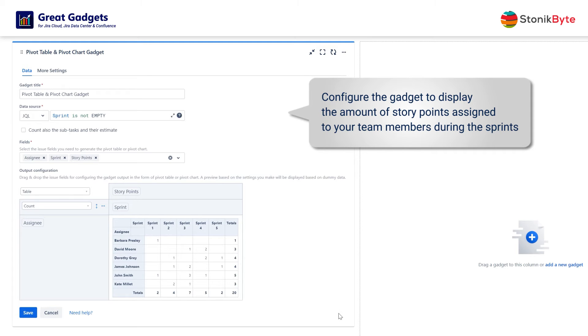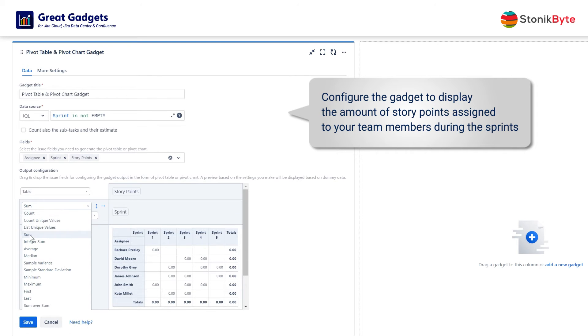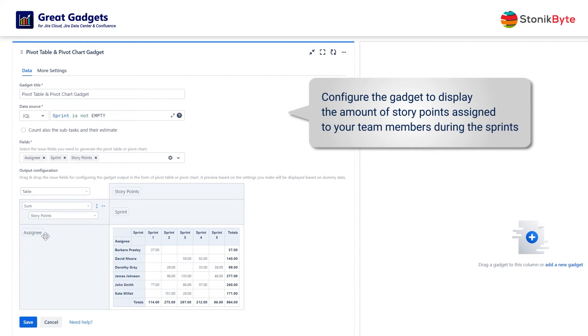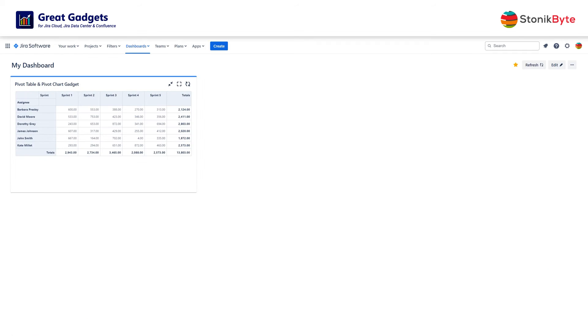Because you need this stat based on story points, change the calculation method from count to sum of story points. Click save. And there you go. The table is now displayed on the dashboard and shows real-time statistics based on Jira data.